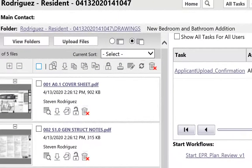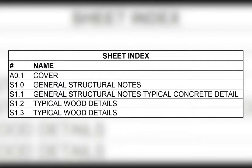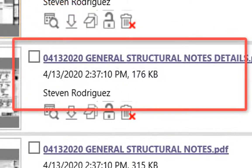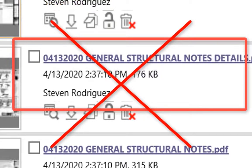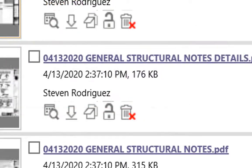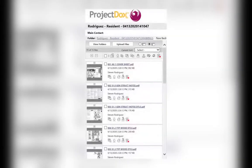In this example, the sheet index matches the plan and there are no names longer than 30 characters. Names 30 characters or longer can cause documents to fail to upload when resubmitted for corrections. When the naming protocols are followed correctly, the reviews go through the process sooner, keeping your project on schedule.